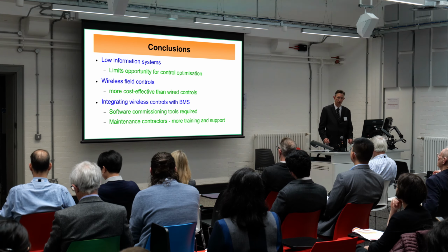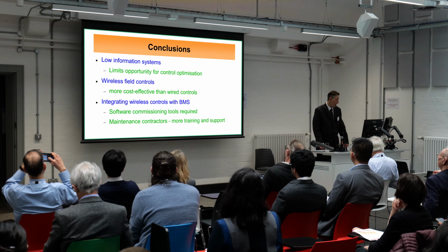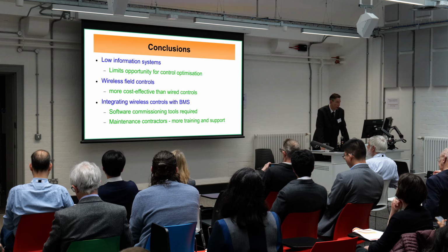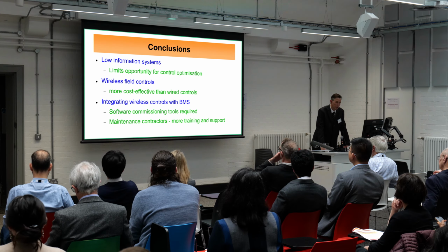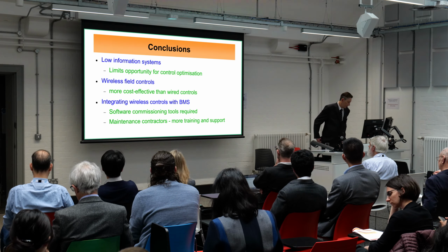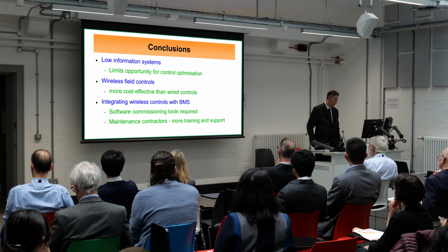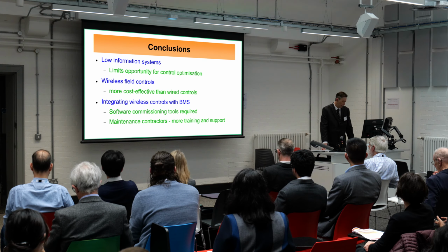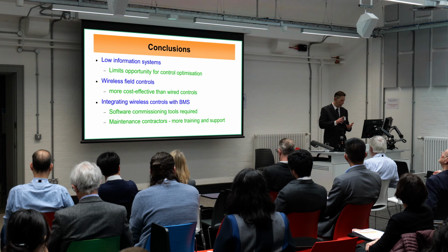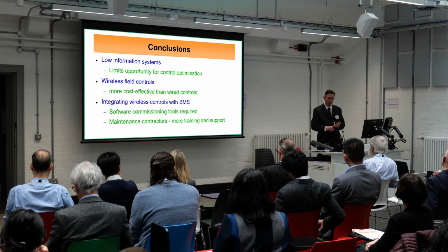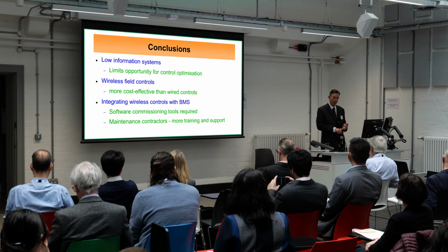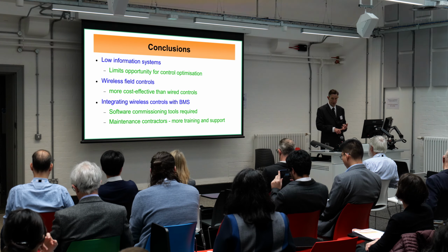So, conclusions. I mean, fundamentally, the conclusion is by putting in more intelligent controls, provided they're justifiable cost-wise, we can achieve energy savings. But I think the two conclusions we learnt from doing these sort of projects is that when you're deploying thousands of field controls, you need software tools in order to capture all of that information and commission it efficiently. And the second thing is smart buildings, to coin a phrase, require smart maintenance.